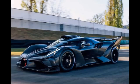They shortlist 3 vendors. Vendor A offers a top-of-the-line engine, 850 horsepower, for $100,000 with a 12-week lead time. Vendor B offers a reliable engine, 780 horsepower, for $80,000 with a 10-week lead time. Vendor C offers a good value engine, 750 horsepower, for $65,000 with an 8-week lead time.